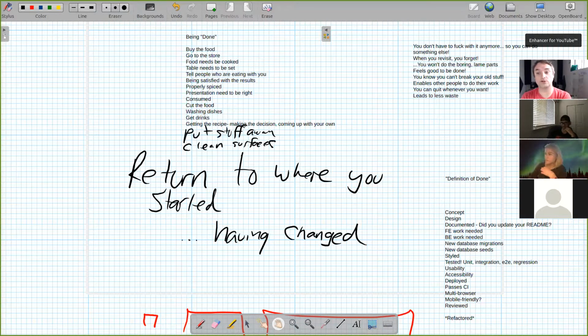For people who are in the Scrum lesson, any guesses who determines whether or not something has met the definition of done? Scrum Master. Wait, no. Product owner. Product owner is the person who determines whether or not something has met the definition of done. It's one of their primary responsibilities. You as a development team member are submitting your work. Your PO is responsible for going down your DOD and going like, yep, sounds good to me. Especially when there's like interpretive parts of it, like that's their choice.